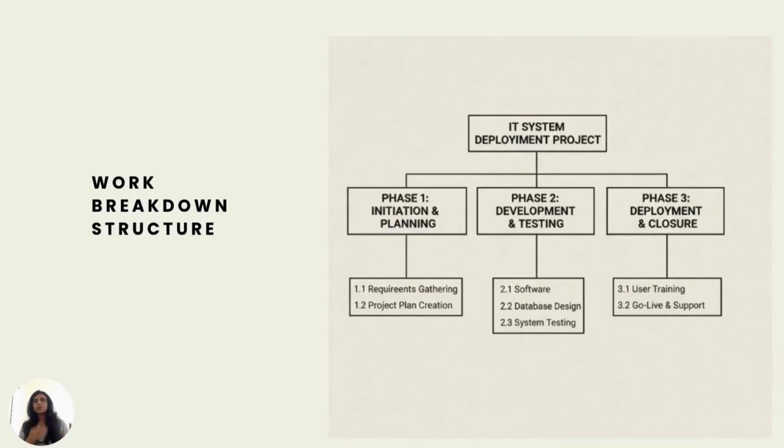Now, once we collect the requirements, once we know how we will be managing the scope, then you'll have to collect the requirements and define the scope. Once the scope is defined, then you break it down into smaller tasks or work packages. That's what we call it in project management. If you're following a traditional waterfall predictive approach in your organization, you must have seen the WBS. WBS is nothing but the breakdown of the scope. It is a detailed breakdown.